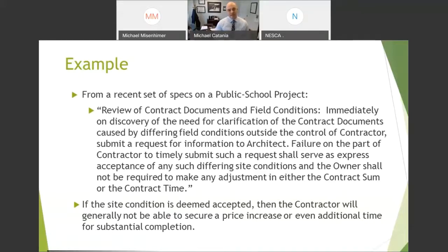Once you have that system in place, it's something you can easily do, especially on the larger jobs with public owners, where no one's going to get too offended by receiving a notice of claim on an issue like this. And I call the owner, call the architect up beforehand, say, look, I've got to do this just because of the specification, so expect this, and you can move along. But at least you have that documented, and you show that you followed the required notice provisions.